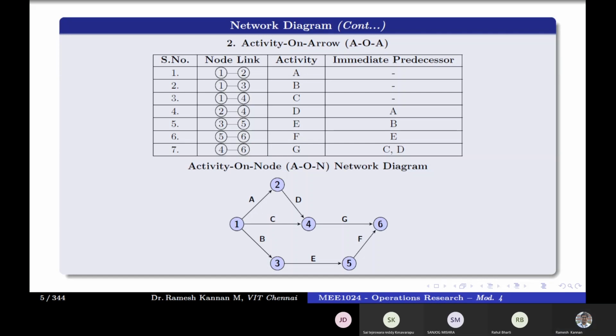If they give that in a schedule, or apply for a contract, what happens when there is real rain? Then the contractor will suffer a great loss. In order to accommodate that, there is something called a dummy activity, where they maintain the network logic. For 4 to 5, they give a dummy, so that once it is required, they will fill it with the duration.